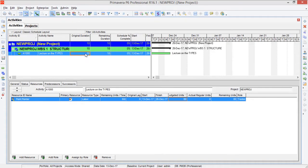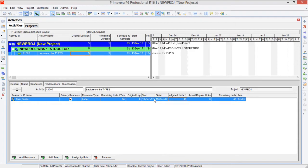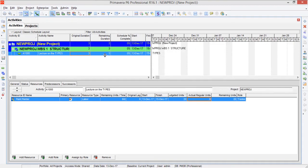If I restore the duration back to 5 days and now change the budgeted units from 40 to 20, since the units per time are constant, we will see the duration change. You can see it jumped from 5 to 3 days. Actually it is 2.5 days but it's rounded up to 3 days.